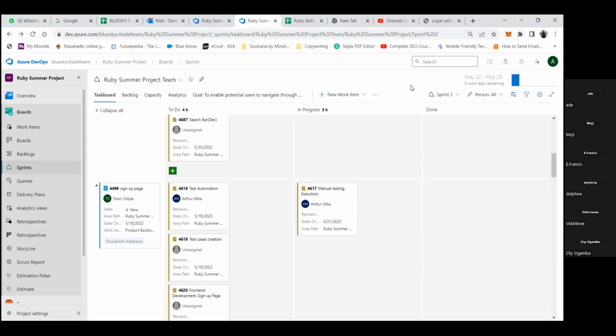Sprints that you're working on. So if it's 6 hours per day after you've worked out your capacity, I know we've put 3 down, but don't worry about that. I'm looking at a situation where you have an 8-hour workday, and the productive hours after working out your capacity come to 6 hours, or 5.5, which is, let's just say, 6 hours. And Segun is saying that it's going to take him 12 hours to work on a particular task. How many days is Segun going to use to work on that story? 2 days. 2 days. Well done.